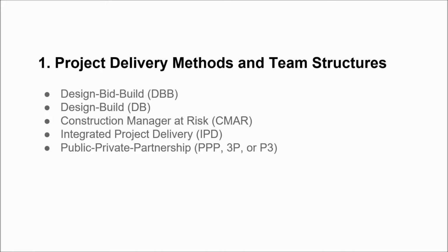CM at risk is a project delivery method in which an owner retains a designer to provide design services and retains a CM to provide construction management services for a project throughout the pre-construction and construction phases. The CM is usually a licensed general contractor. Thus, unlike the design bid build approach, the contractor is involved during the design process. In CM at risk, the owner is responsible for the design before a GMP, aka guaranteed maximum price, is set.